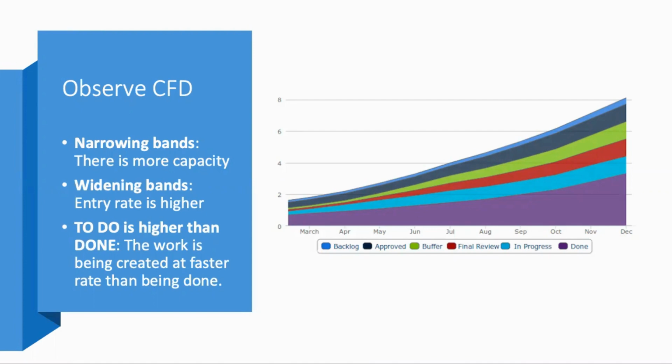You have to look at the demand patterns. You have to look at how your demand is coming into your system. Is it a burst demand, or is it coming in batches? Is it coming in bulk, or is it regular? When you identify your demand, you will identify what work item types you are doing, what is the type of work, and then you try to classify them into classes of service and act accordingly, so that you can have a smooth flow, a smooth band in the CFD.